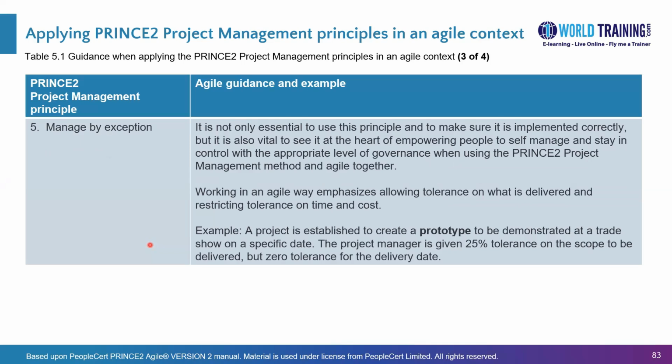Now, in Agile, this becomes even more important because Agile is about empowerment. So layers below in the management layers of project management should definitely be empowered, so that they have more authority to make their own decisions. However, some tolerances should be set so that they can always escalate above to obtain support. Because exception management is mainly to make people aware that the upper management is there to support them whenever needed. But then do not escalate if things can be decided at the lower level itself.